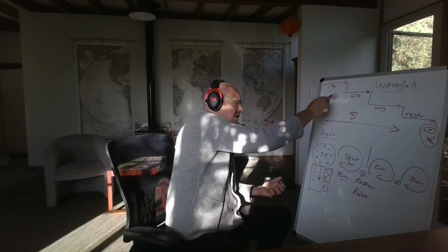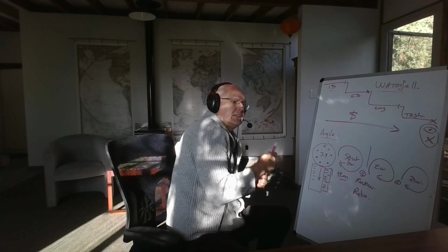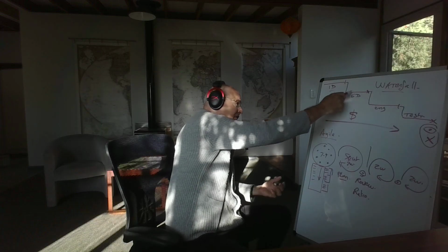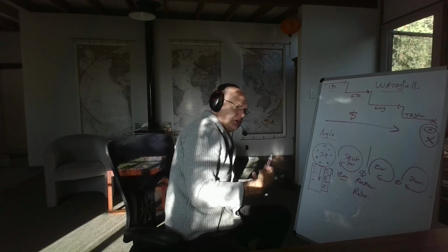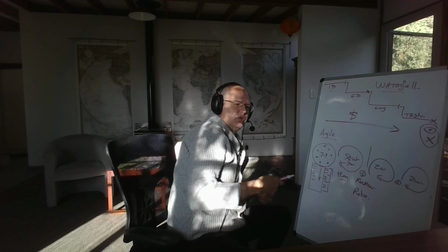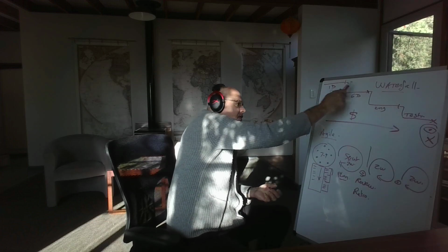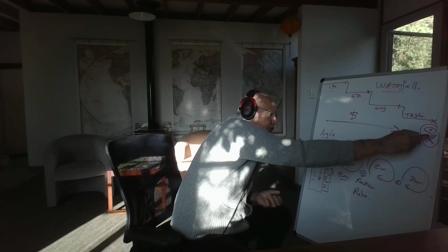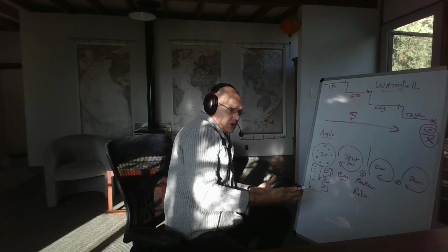And then, when that process was finished, we would move into a game design phase where we would do a lot of those documents. Then, at the end of that phase, we would pass it on to the team, engineering, art, etc. Implement everything, then move on to testing, where our QA would take a look at the game. And then and only then were we able to see how everything was coming together.